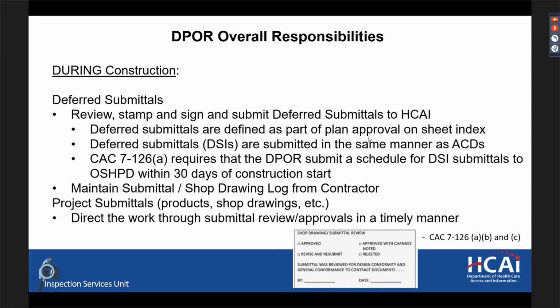And CAC 7-126A requires that the DPOR submit a schedule for DSI submittals to OSHPOD within 30 days of construction start. So if you're working on a project which has 10 deferred submittals listed on the cover sheet and the project starts, we expect to see, within 30 days of that contract starting on site, a schedule for when those 10 DSIs will be submitted.